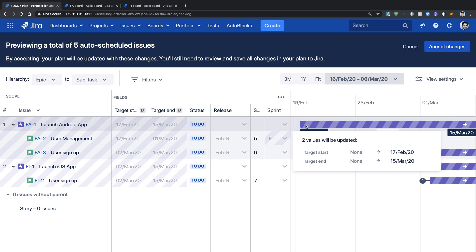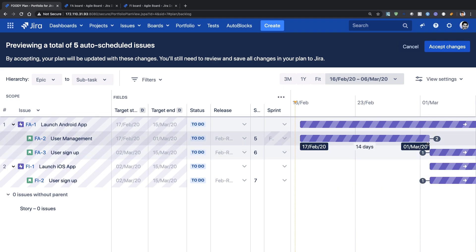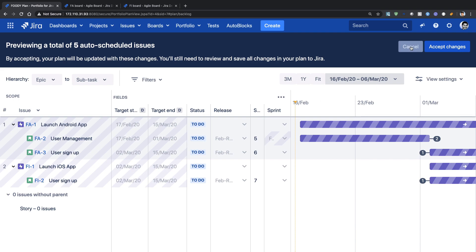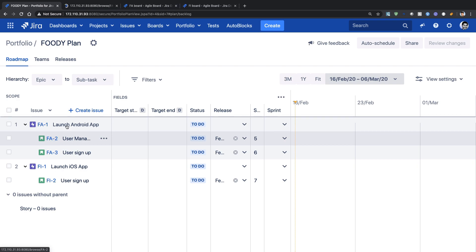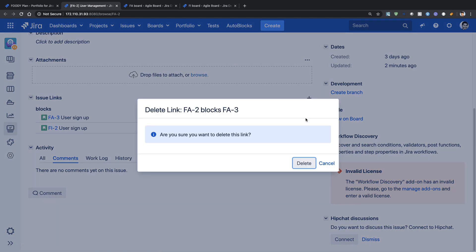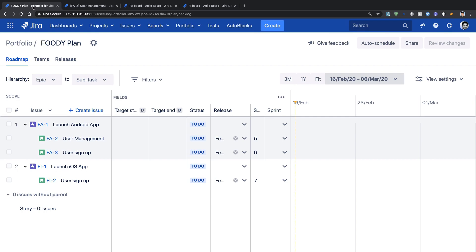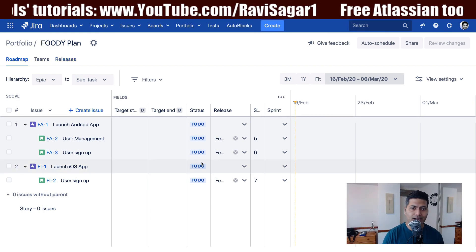We are trying to release something in February — at least something before the end of the month. But if you look at this particular plan, it is going beyond March. To make sure the plan works for you, maybe you can add more capacity to your teams or reschedule the work so you're not doing too much at once. For the sake of explaining, I will open one of my stories and remove the dependency. I'll click on the user management story and remove the two dependency links in Jira, and I'll do the same thing for the other one.